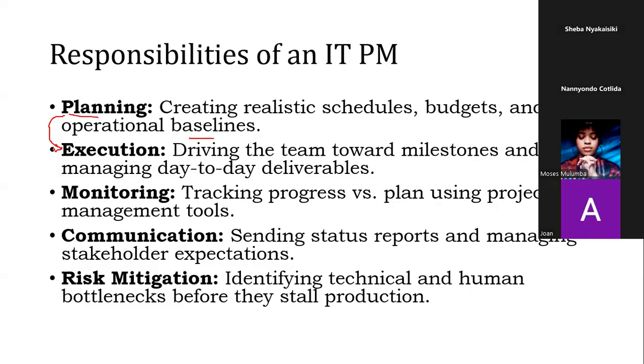You make sure that the team that is supposed to implement is ready. That means if there's training that is necessary, you carry out training. Then if there's migration of data from old to new system, you go ahead and do that. If there's testing, you do that. And each milestone, that is you doing the execution.